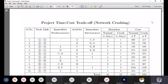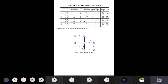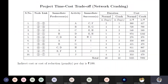Let's take a look at project crashing, or network crashing, also called time-cost trade-off. We've seen this earlier with a massive network, but this lecture focuses on a simple network — activity A to J — with 10 activities, presented as an activity-on-arrow network diagram. The duration is twofold: normal duration and crash duration. Normal durations are higher whereas crash durations are lesser, because we reduce the number of days from the normal.